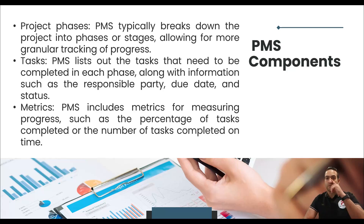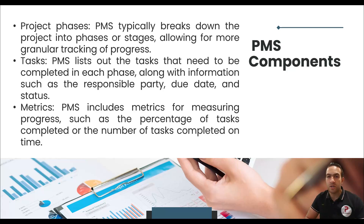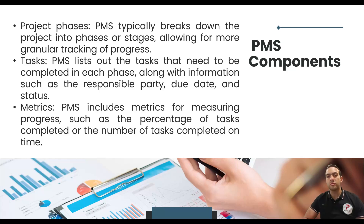The components of the PMS are similar to your schedule, as they are extracted from it. It is typically a breakdown of project phases and stages, allowing more detailed tracking of progress. It could use the same WBS from P6, or you can use activity codes as your tracking structure. Under this level are the tasks with start date, finish date, and most importantly, the KPIs — planned, actual, and variance — which you track every month, week, or day throughout the project.